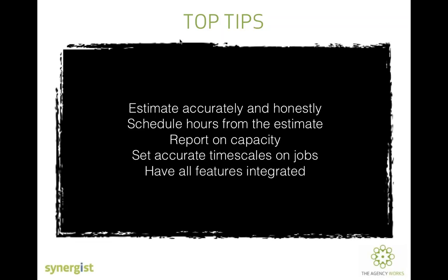Okay, and another thing is have all of those features integrated. So not necessarily features. You don't have to use a system to do this. It may just be those processes. So ensure that all of those are interlinked. So having your estimate, then Gantt that estimate, or put a timescale on that estimate, and then schedule the hours from that estimate. It will just make things so much cleaner, so much smoother, and it will make everybody more aware of what's required of them.